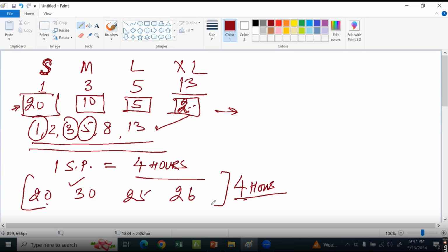Is that okay and clear? What is the story point here? All we have to do is pick a number from the Fibonacci series and assign it. That comes to about 50.5 days. Perfect. With that, we will be able to decide how many sprints will be required. Can we now decide from that how many sprints will relatively be required to finish that job?